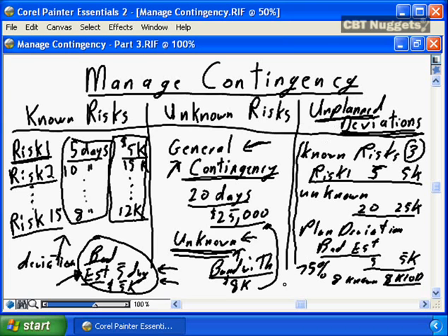At this point in time, you have extra capacity of an extra $8,000 and 10 days, and by this point in time, you may have only consumed 10 days and $12,000 of the actual unplanned contingency, that in fact you can start to apply contingency funds against planned deviations.